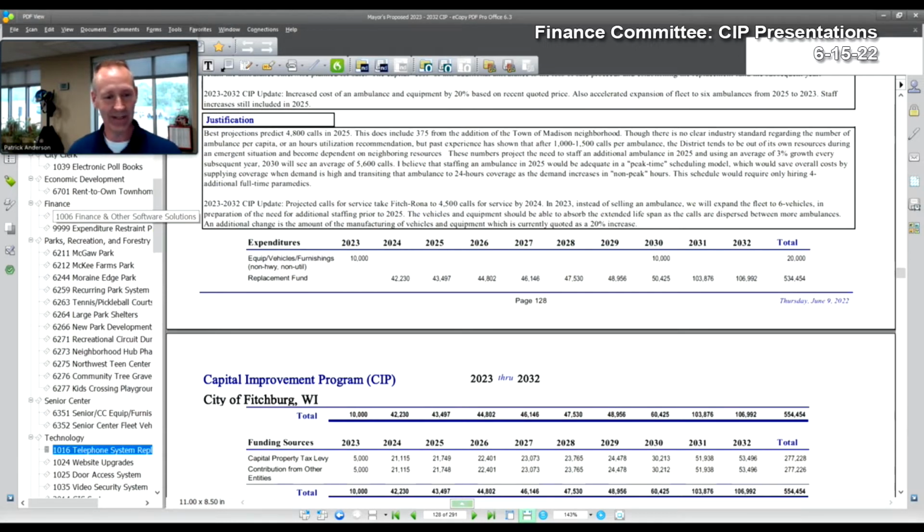So I know everyone who's purchasing, I'm sure Public Works will be talking about it as well. That's just what we're seeing out there as far as that vehicle replacement program. The hope is that someday that is going to level off, but they are 12 to 18 months already, and probably within the next few months, they'll be shooting out for up to about 2 years by the time we order an ambulance. So that's what you're going to see in here.